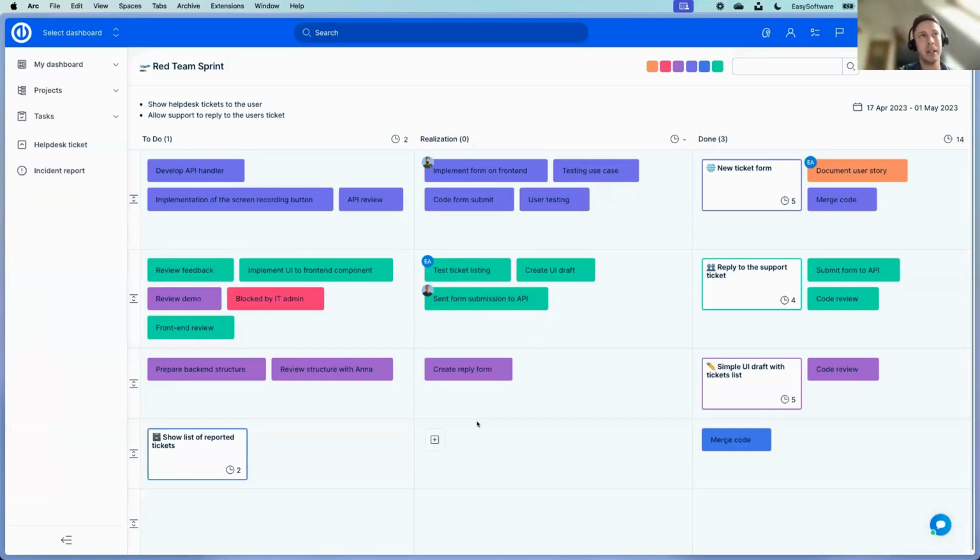There's, of course, separate product backlog boards. There's also sprint review and planning board and so on. What we're looking at is just the current sprint work view. And this sprint has two goals. It has certain PBIs that developers are working on. There's a breakdown of these PBIs into smaller tasks that devs do. And there's either time or story points, estimate of effort on these, total estimates, a certain time for the sprint, and so on.